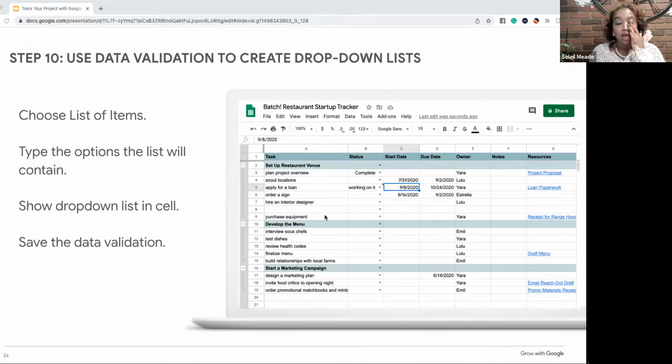So this is showing, again, what I already covered, that data validation only allows specific information to appear in a cell. So if I come to Vicky's sheet and I am trying to type in the status that one of our speakers needs help, that's not on a drop-down list. So I'm going to have to select I need further assistance. That's going to flag the project manager to say, hey, let me check on Soleil and see what she needs. So that is really empowering to know, if you want to limit the amount of information that is put in a cell, create your drop-down list.